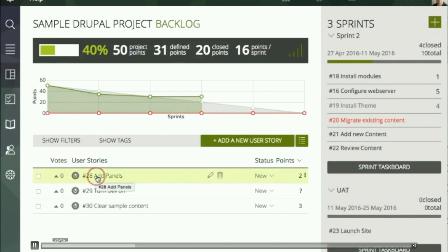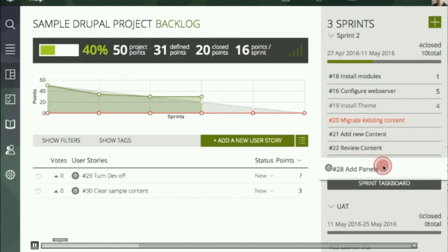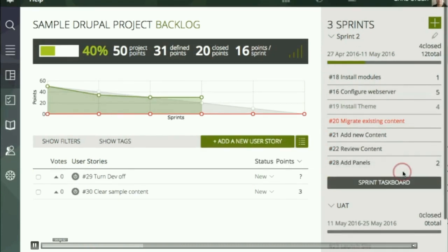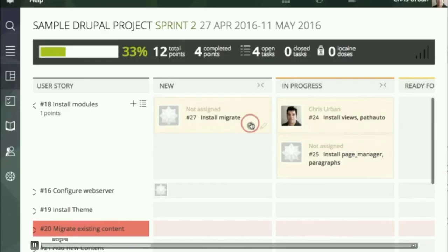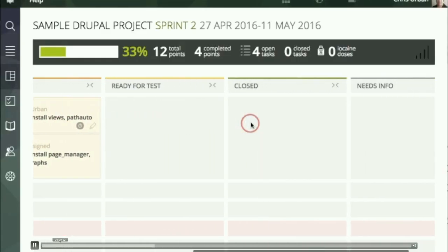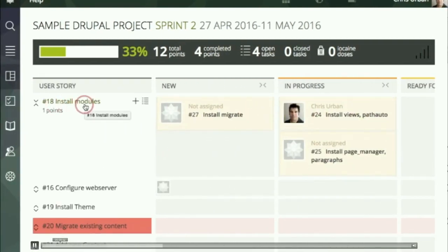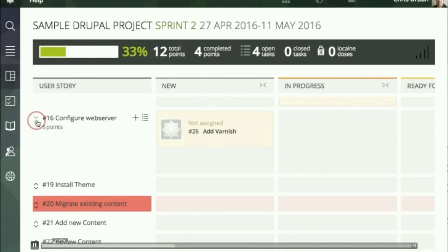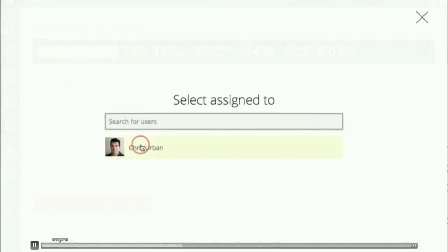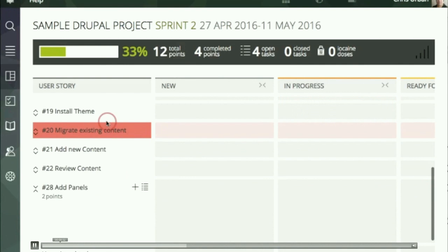And then, similarly, you can also vote tickets. You can drag them into the sprints, and now I go into the sprint board, the sprint task board, it calls it. And now what's nice here is you get automatic horizontal swim lanes by the ticket, and then these are the subtasks within that ticket. And if you know JIRA, you know that that doesn't happen in a swim lane. They don't show up along with their parent ticket. They show up as separate tickets. So for me, that's great.